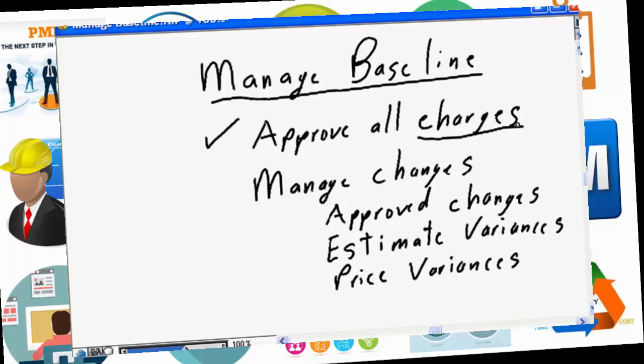If you're expecting an invoice, or if you know an invoice came in from a supplier, from a vendor, you need to check and make sure that that invoice is coded to your project, that it isn't slipping around the organization and going unprocessed for a period of time. Two reasons for this. One, again, is the time, the cash flow.